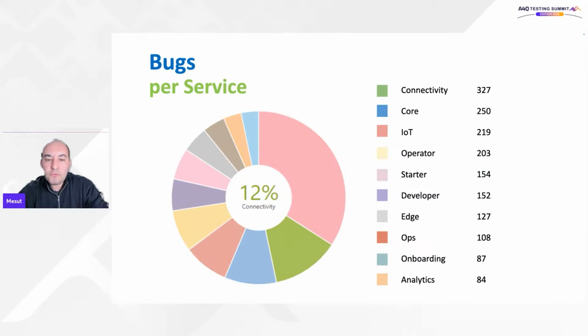One more example of a metric that we can show or monitor on the bugs is bugs found on the module or the components or the unit on which the bugs were found. For example, on this slide, I have a microservices architecture and there are lots of different services. And I show the percentage distribution of all services. For example, let's say I found half of the bugs from one certain service. I have 20 of them, and only one of them is raising half of the bugs.